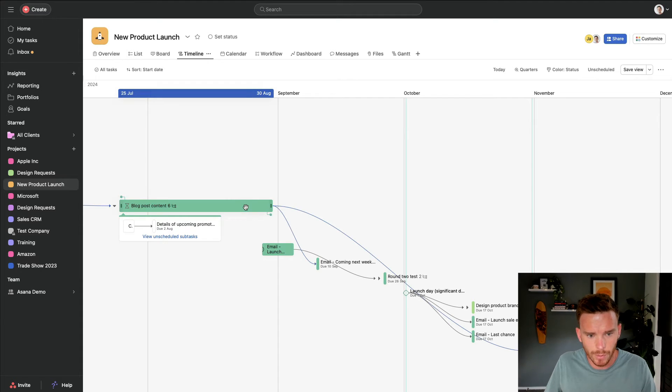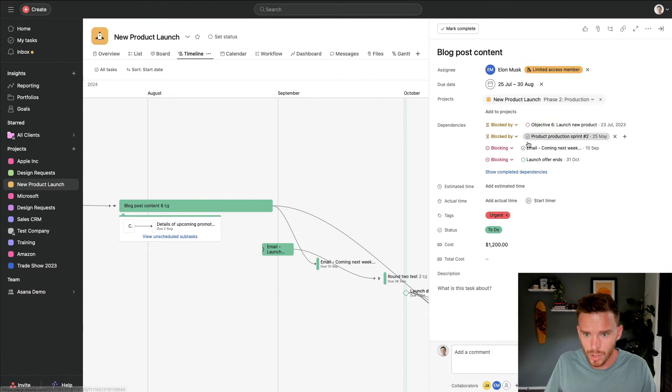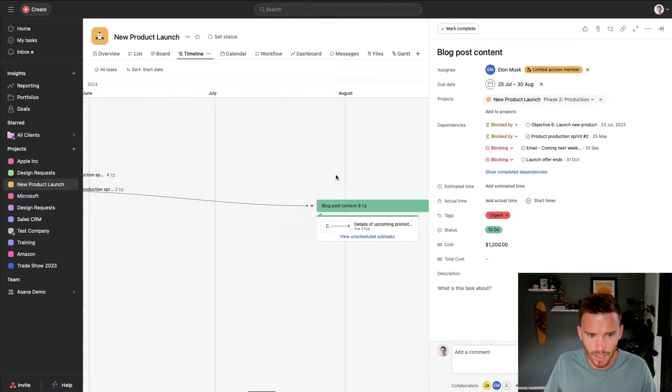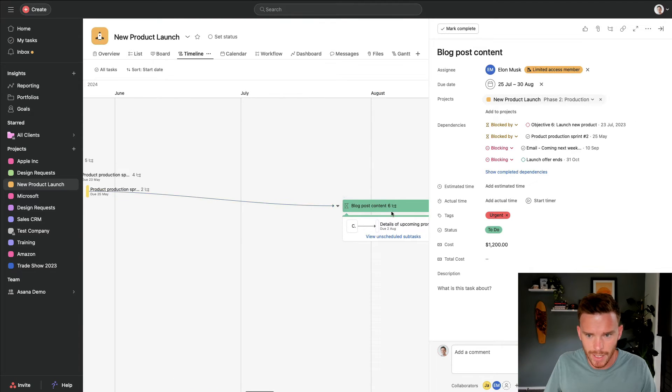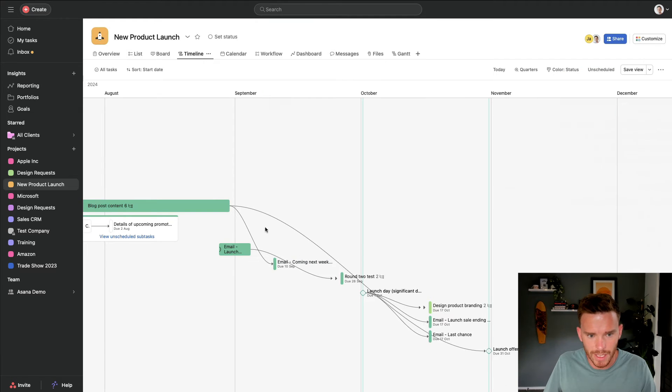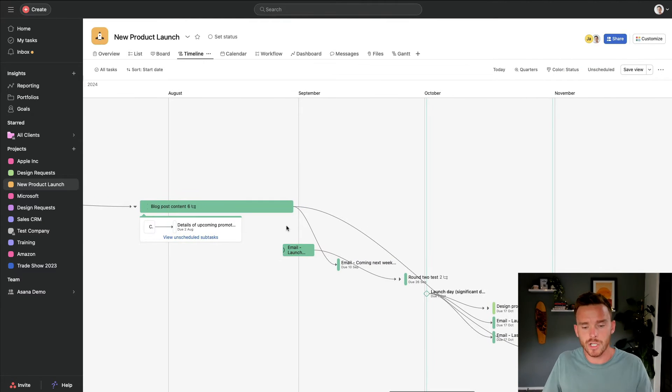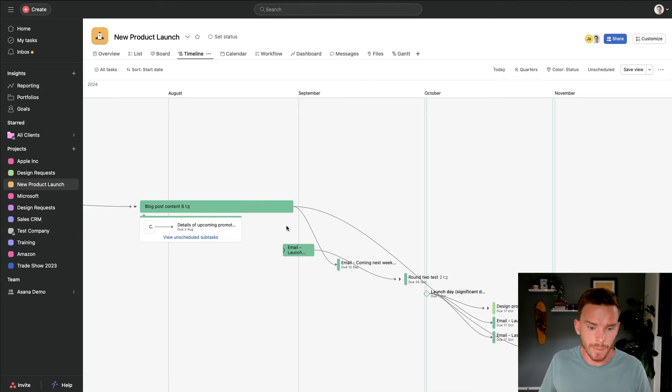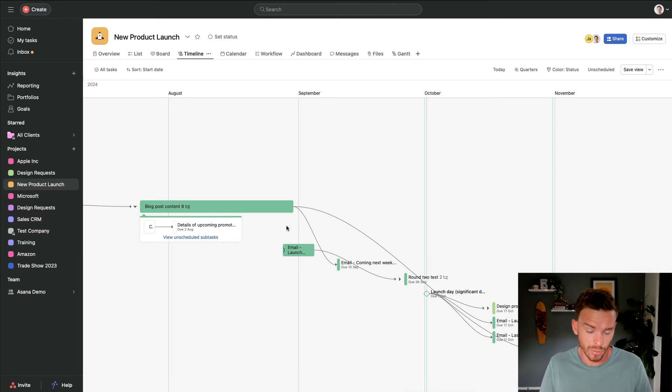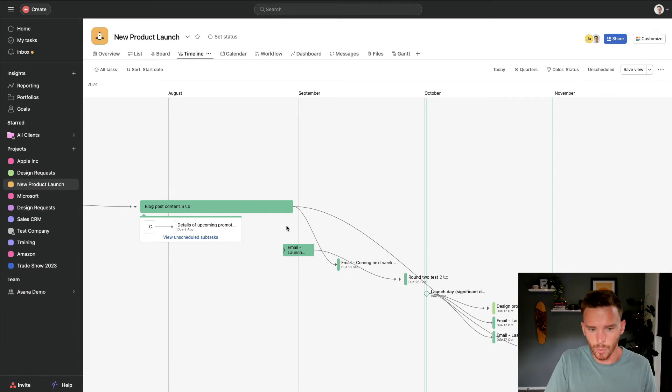I can also very visually see the dependencies between tasks. For example, this task, blog post content, is blocked by a couple of upstream tasks. We can see those there. And it's blocking a couple of downstream tasks. We can see those linked through these arrows. This helps me visualize and understand the relationships between my tasks. So I can see maybe if we're not making progress in the project, maybe there's a certain task that's dependent that we need to get done first.